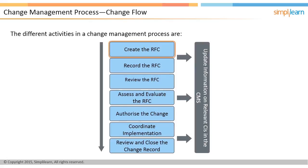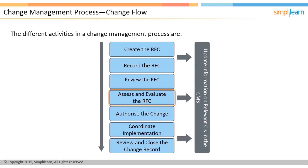The change management process starts with a Request for Change, or RFC. The RFC is logged in the change management system, and the information is captured and tracked to completion. An initial review is performed to filter RFCs that are incomplete or incorrectly routed.